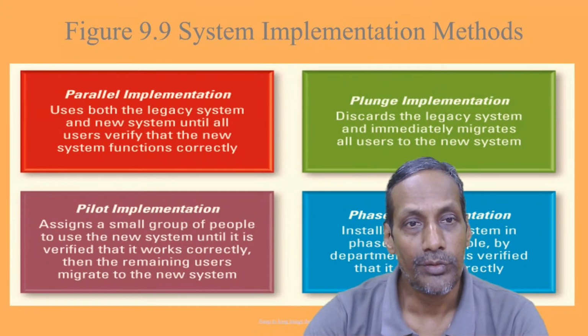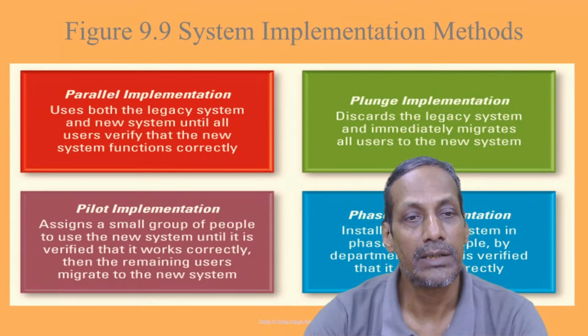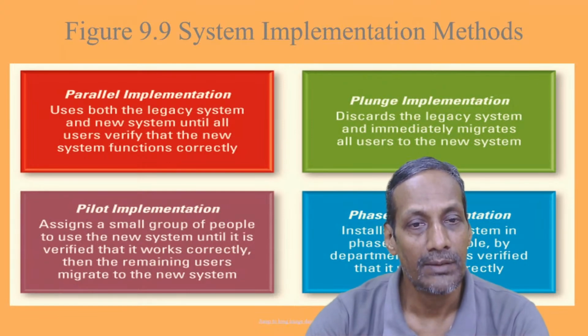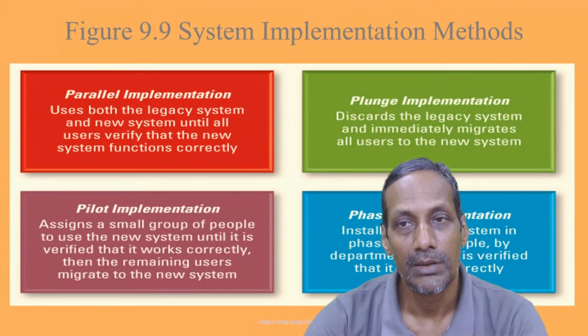If you have time, you can also go for pilot implementation, wherein you assign a small group of people to use the new system until it is verified that it works correctly. Then the remaining users migrate to the new system.